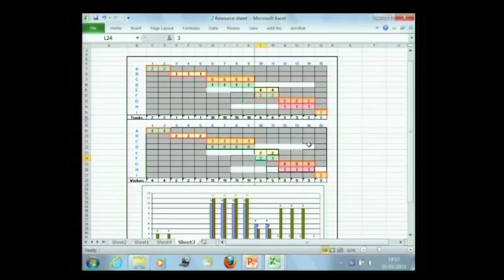So something like this, for example, let's take here I need 4 trucks and I will finish it in 4 days. What if I give it only 2 trucks? Yeah, so if it's a linear assumption, I can go with 2. It might change certain things in some places, it might not, but I can do that, and now it has actually brought my whole truckload down to 8 trucks.